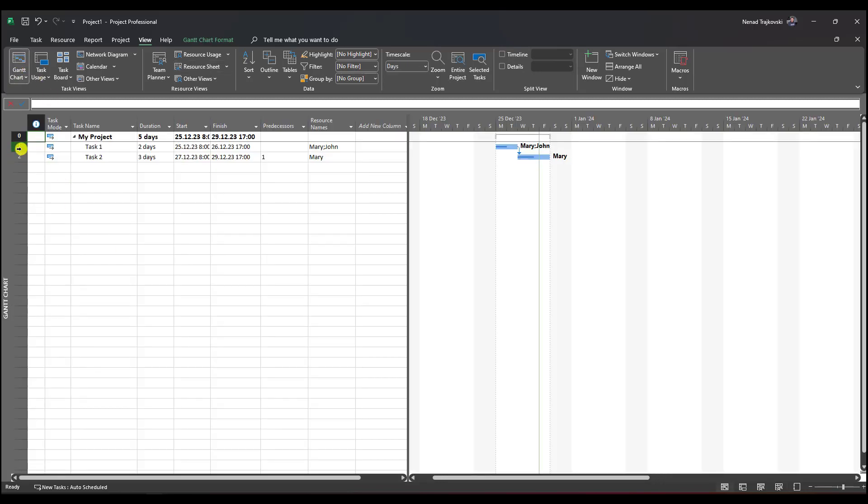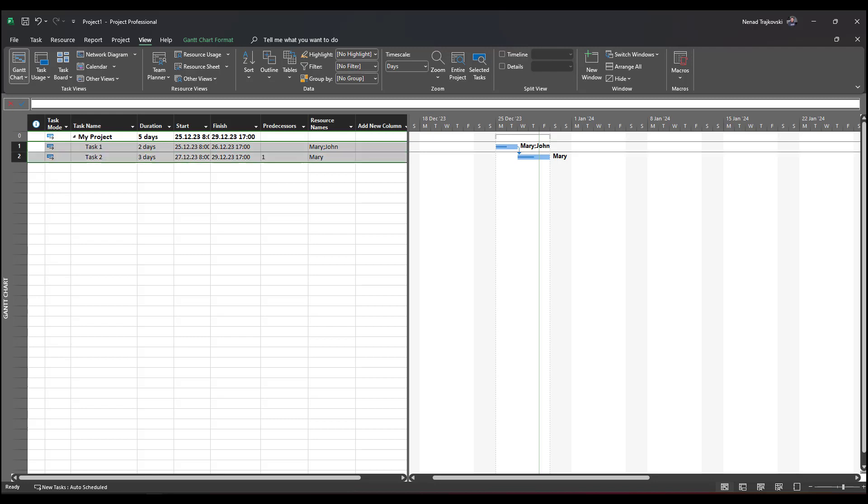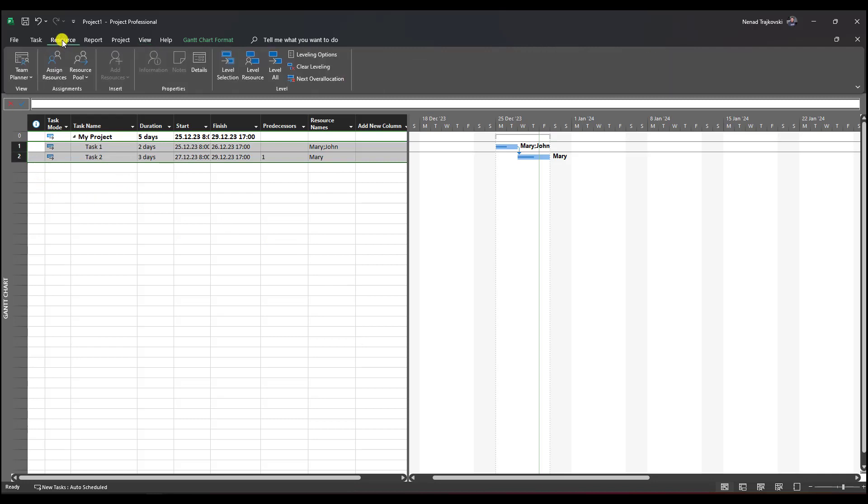Going to Gantt chart, I'll choose both those tasks. I'm not going to do it one task at a time, but for all tasks. In my example, both tasks one and two. I select them and go to Resources, then Assign Resource.